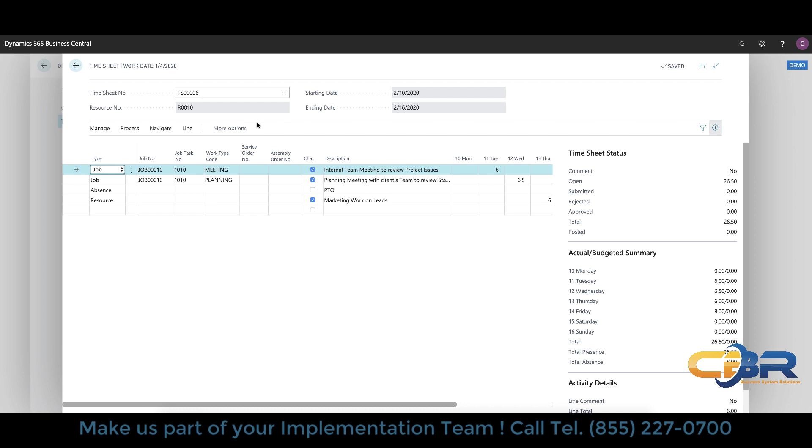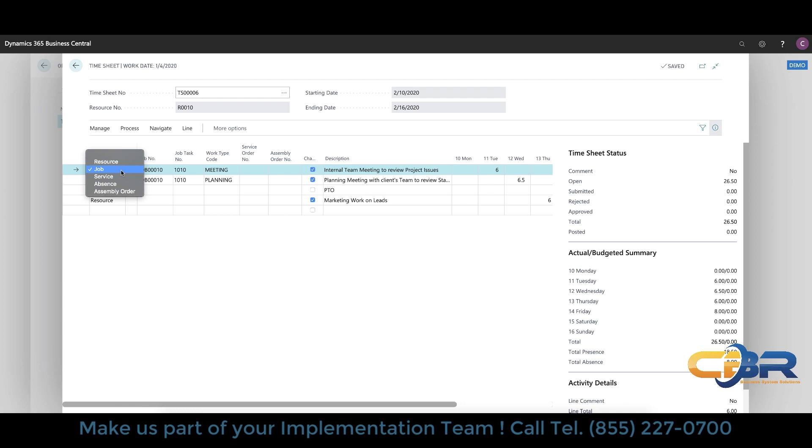It has the ability to track a number of different types of activities: resources, job, service, absence and assembly orders. So as you can see here the timesheet functionality in Business Central is not limited to the job costing module but can be deployed throughout a number of different modules of the Business Central solution. In my case I'm focused on job costing so you can see that the first two entries are specifically referring to the main job and a task number that's related to that job. Within the task number you can actually create multiple work types. In my example here I have a consulting phase that I'm going through and that consulting phase is actually divided into a meeting and a planning type. So as a result of that on my timesheet I can actually separate these two type of work types from each other.